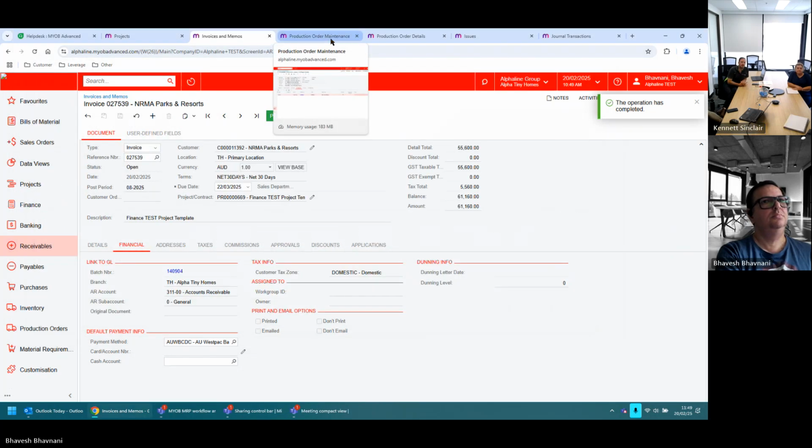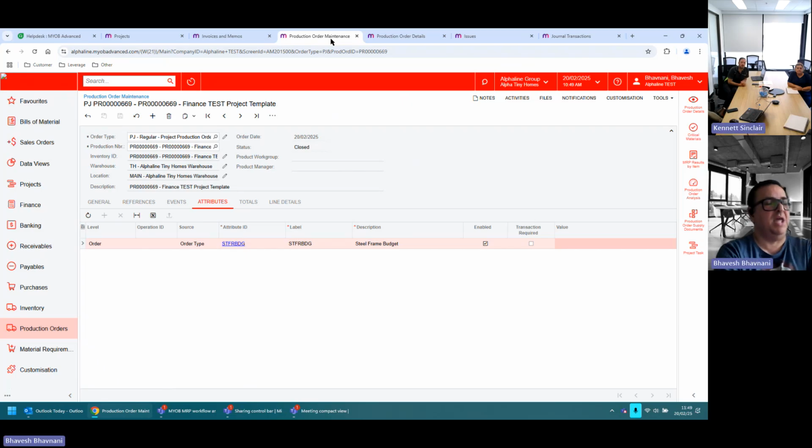I mean, that's how production manufacturing generally works. You don't record your cost until your manufacturing is done, but you record your revenue as you invoice. Yeah, since your manufacturing cycle is very long, right? It's not like it happens in a day or so. It happens over 3 months.